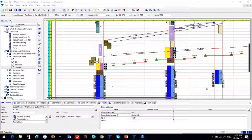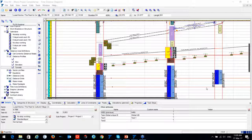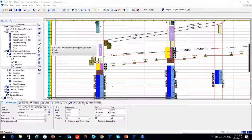Mr. Jacob asked whether there is an update file in TILUS similar to Primavera, so he doesn't need to redo the graphical representation every time. Yes — you update the file the same way: you enter progress on Primavera, export it, and import to TILUS. It has an update file functionality, so you don't need to redo everything or lose any graphical representation.